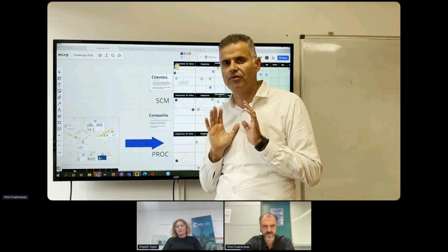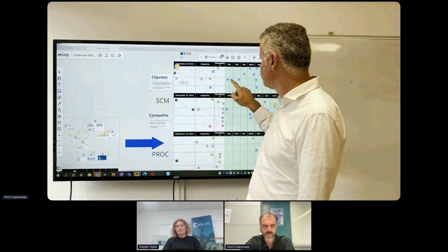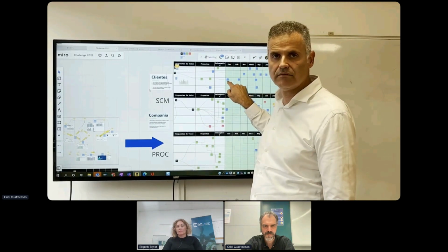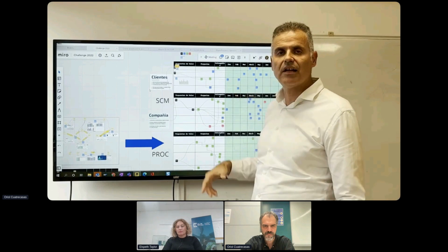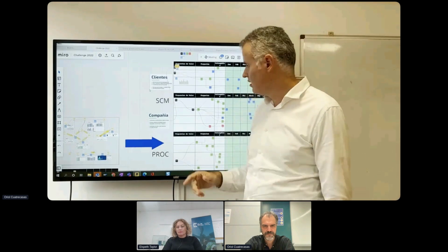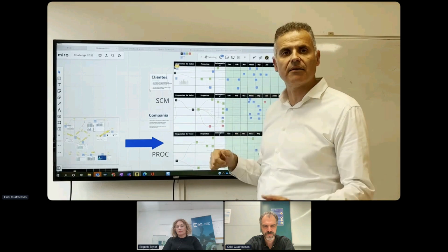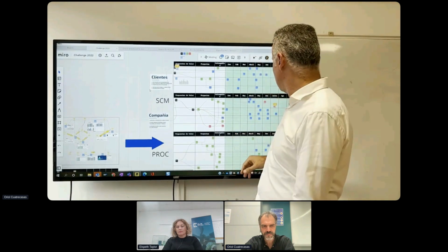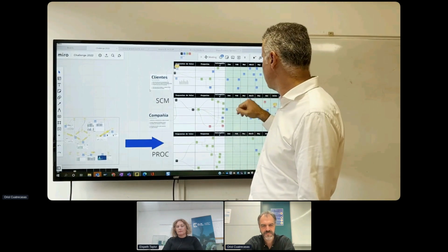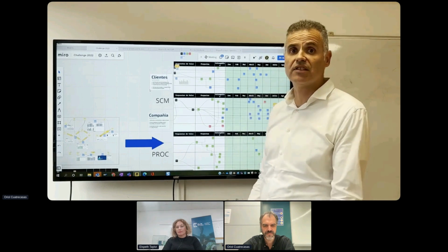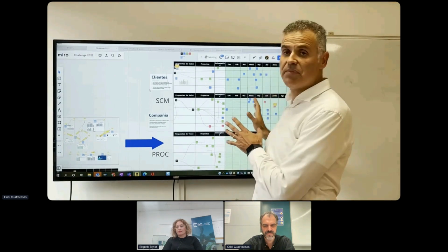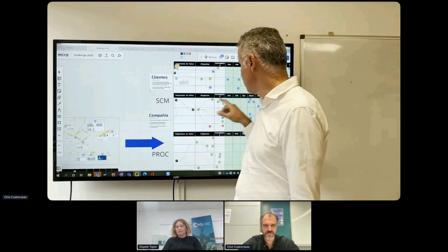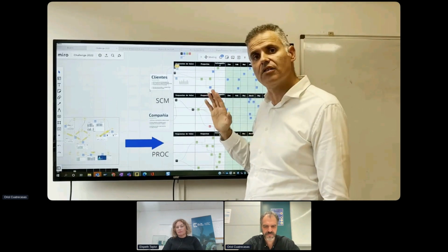This is not important for me. For me, what's important is which is the next deliverable, who is the responsible, and what is the status. If it's in blue, it means that it is finished, or if it's in red, something is wrong. Thanks to this picture, I can focus on where we have problems and not spend time on the part that is running well.